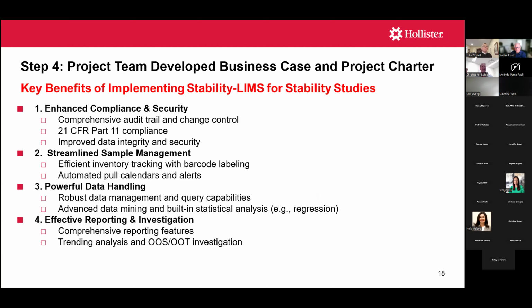So for our business case, we really relied on a lot of what the external consultant said during his audit, that we were at a risk of not being compliant. So that was one of the key things, enhance compliance and security. Such a system would have a comprehensive audit trail, change control, be Part 11 compliant. So it would really improve our overall data integrity and security.